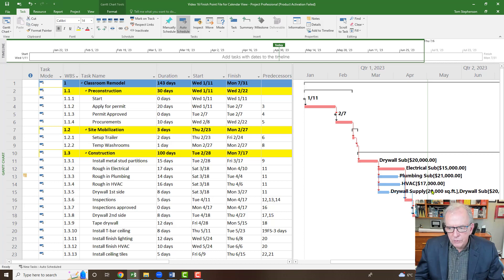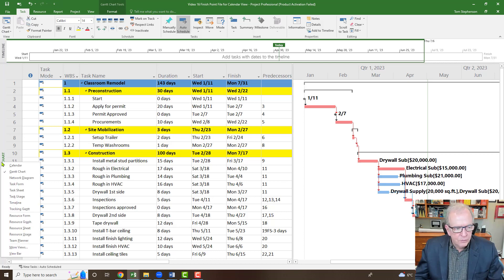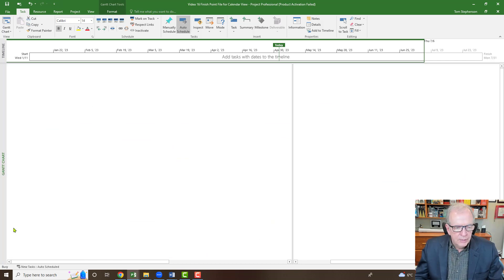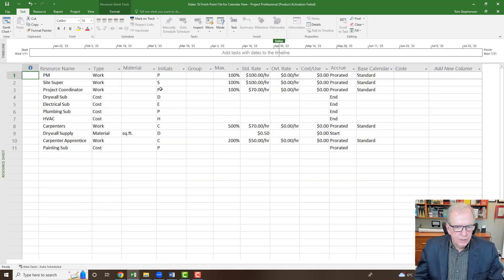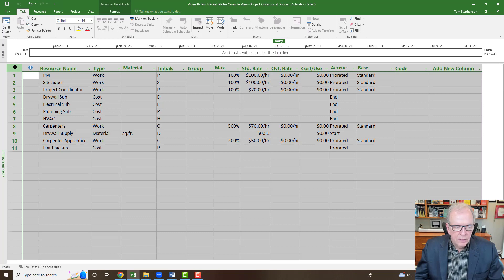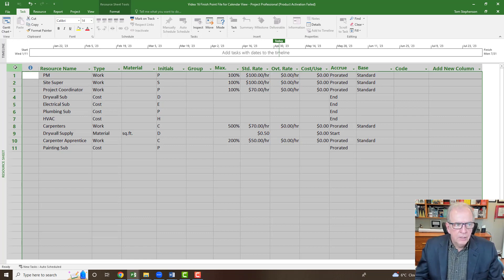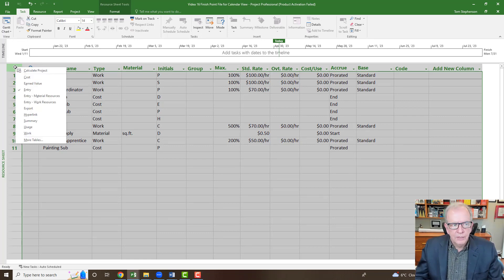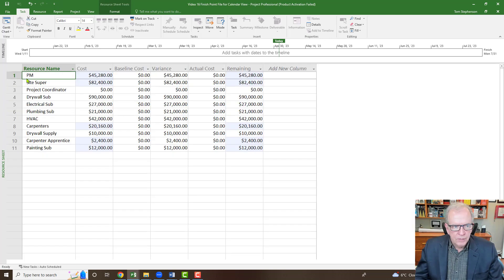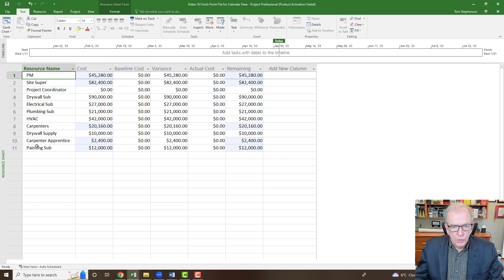We've created a resource sheet. If I slide to the left and go to the resource sheet, we've created a resource sheet with a variety of resources. If I click on the square icon button here, I can right click and go to the cost screen and we can see what costs we've applied to the individual trades or resources that we're using on this particular project.